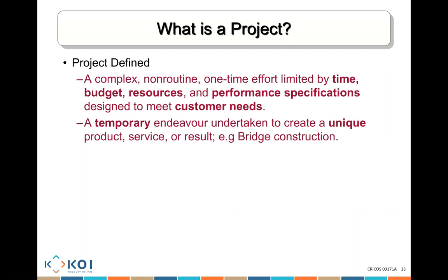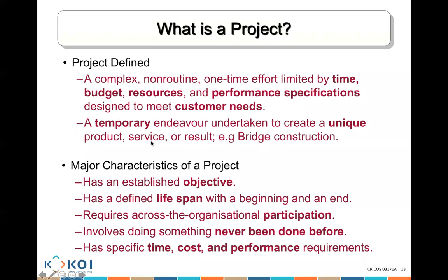Creating a new website is a project. Adding content to the website is not a project. Creating a new application is a project. Adding data day-to-day to the actual application is not a project. So there are things that you do that are routine operations, you do all the time. That is not a project. What is a project? Something that is non-routine. Something you do one time, something that is limited. It has to be done within time, within cost, within specification to reach the outcomes that we are seeking.